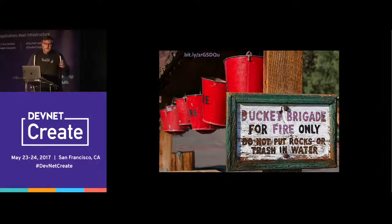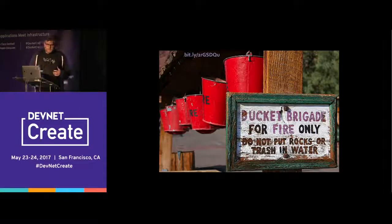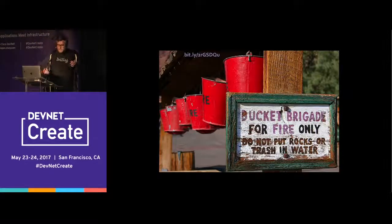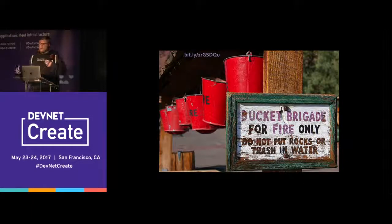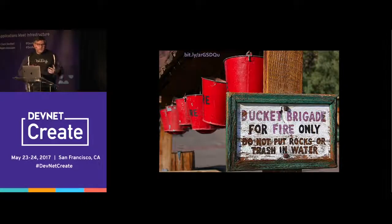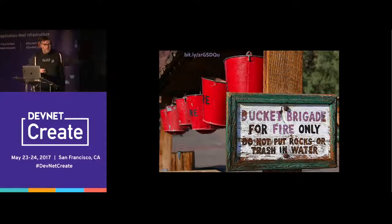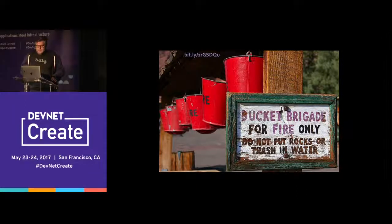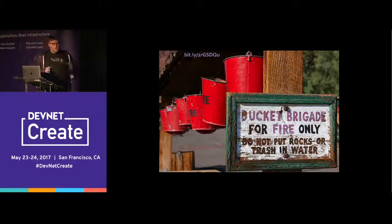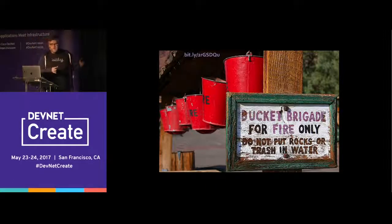Breaking things into smaller moves also gives you a lot of flexibility to learn incrementally and improve your process as you go along. You can start by moving low-risk, low-priority systems — where if they went away for a few days, it's not the end of the world. That lets you get water through the pipes, understand your new environment, identify flaws in your process, and start pecking away at the unknown unknowns. However much due diligence you do, there will be places you know are scary over there — and smaller moves let you start getting information about those areas without doing the whole cutover at once.